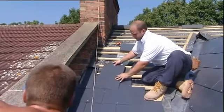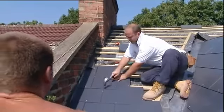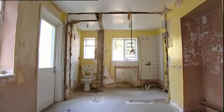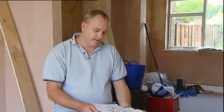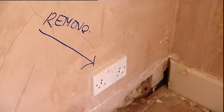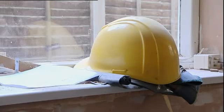It's not normal for somebody who's not here, like, when this job is going. It's a bit of a bind, because obviously if anything goes wrong, he's the one who's got to make the decisions. Ideally, David would have been here this week. Some things, like the downstairs toilets and positionings of the upstairs cloakroom, the ensuite, will have to wait until he gets back next week. By the end of the 2 weeks, the site is at a virtual standstill.